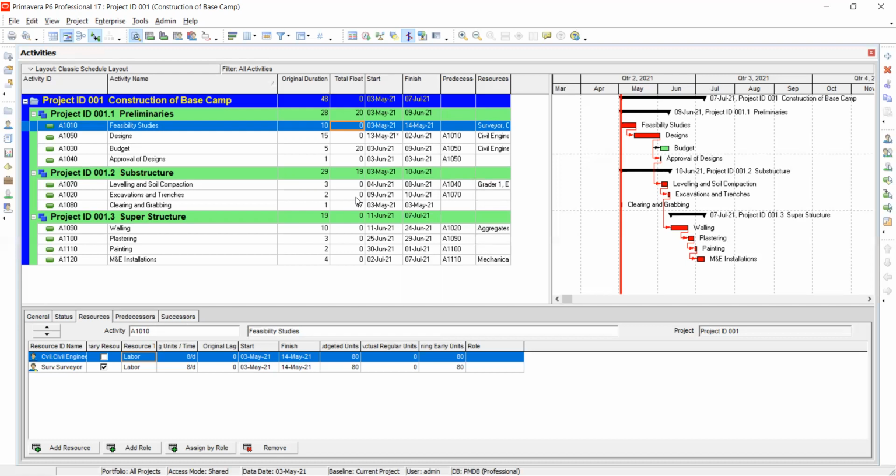Yeah. So in case you delay it past the total float, for example, it has a total float of 3 days, and you take like 4 days, it means it's going to affect the entire project because you've gone beyond its total float. Yeah. So now you can see that here we have a project. It has also its total float. Then these different levels also have total floats, but we're interested in the total float for the exact activities.